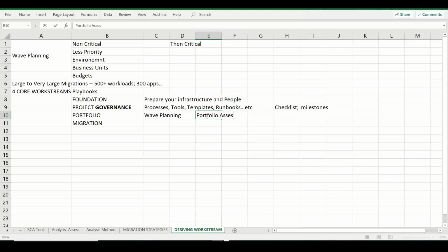So here we are going to start with the approach, which systems will go in which waves. For example, if you have some hundreds of applications or hundreds of workloads, initially in wave one, we might have some guinea pigs, or some test workloads or POCs or whatever. And then we will have some additional workload. Maybe it will gradually increase. We'll have some 10 servers here, some 20 servers, and then gradually, as each wave progresses, we'll have a lot of workloads.